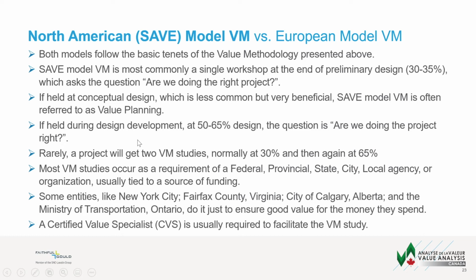Rarely will a project get two VM studies, normally at 30% and again at 65%. Most value management studies are a requirement of a federal, provincial, state, city, local agency, or another organization, and it's usually tied to the source of funding. It's not in every case.